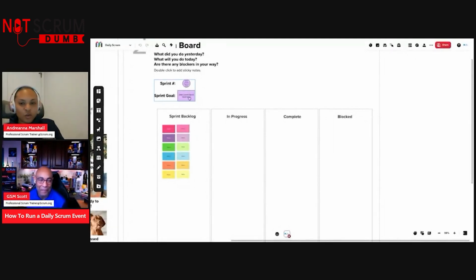Then you have your sprint goal. You have to have this. This is what you're inspecting. And then you have your sprint backlog, in progress, complete, blocked. Every team has their own swim lanes. It's up to you on what the process is here.